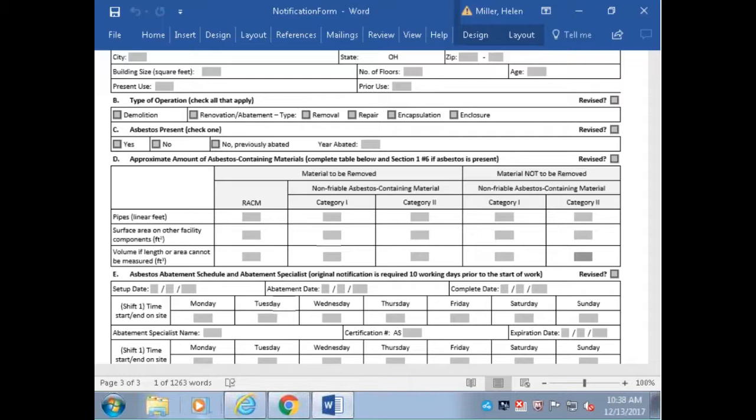And then they'll have the ability to see that. And for those that are abatement projects that fall under the licensing rule, as abatement contractors, you have to have a copy of a building inspection report on site for any project you're on that's a NESHAP regulated project. So if it is uploaded with the notification, you won't physically have to have it on site. We're going to look at that as you submit it with a notification and we have it, and our inspector can end up looking at that anytime they need to by pulling up the notification. So that's just to expand on that a little bit.